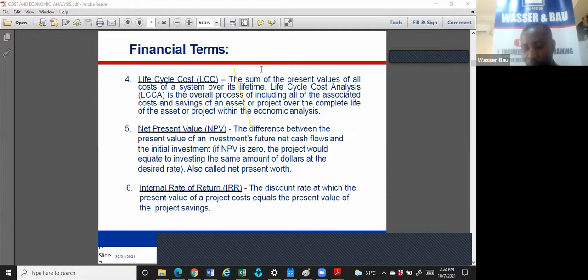What does internal rate of return do? It helps to give you an idea of where you cannot go below. If you're negotiating for a project or for the cost of a project, it is good to have your own internal cost to say anything below this is no longer profitable. In other words, any negotiation must start from, let's say, 15%. I told people that companies like Julius Berger, before they go into a project, must make sure they are seeing a clear 50% profit.